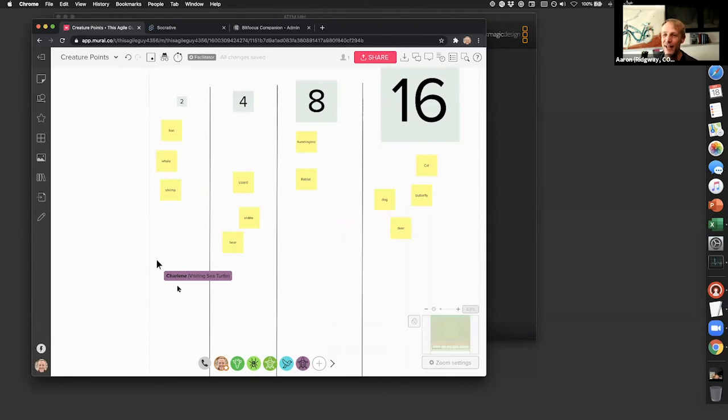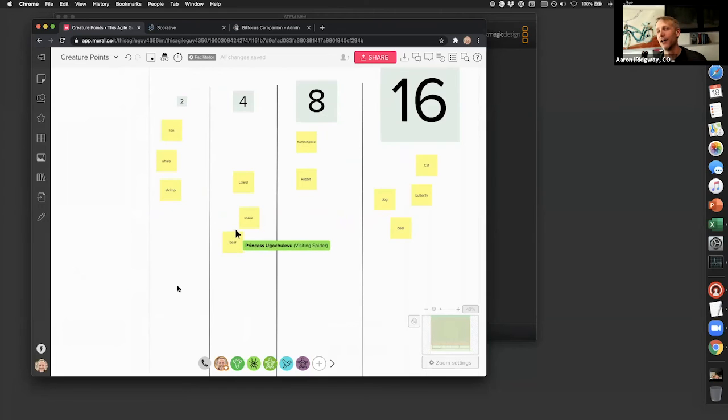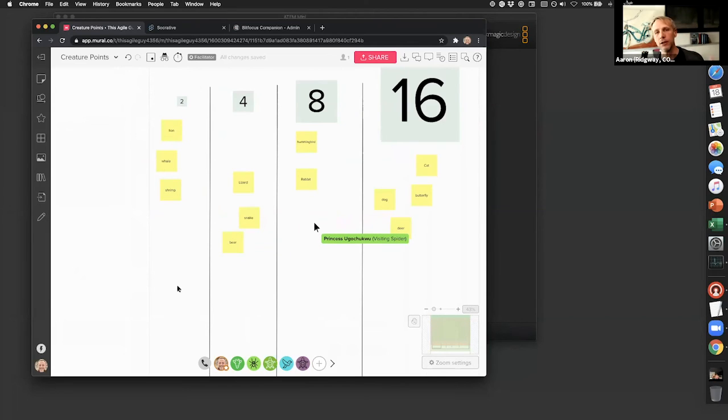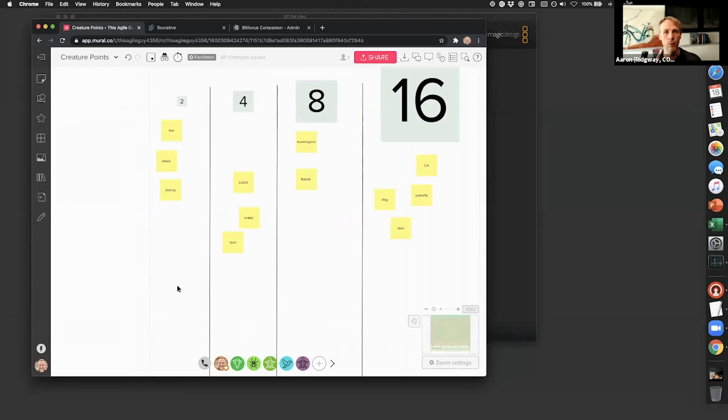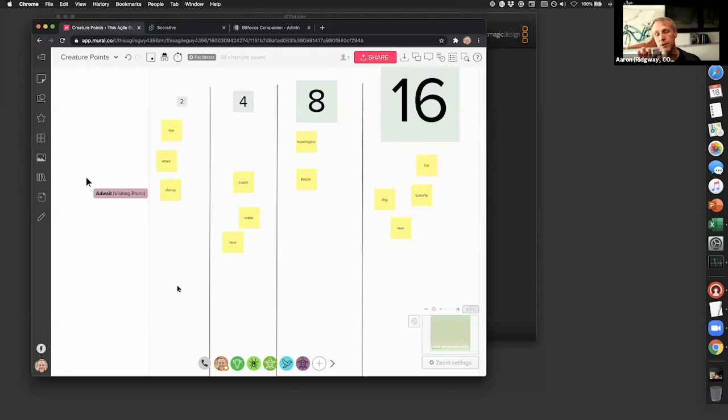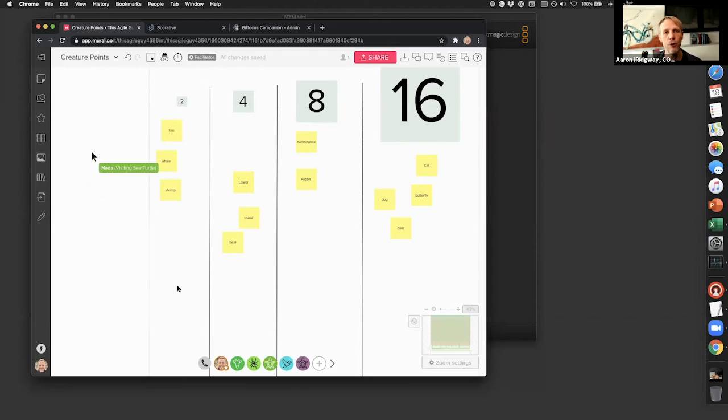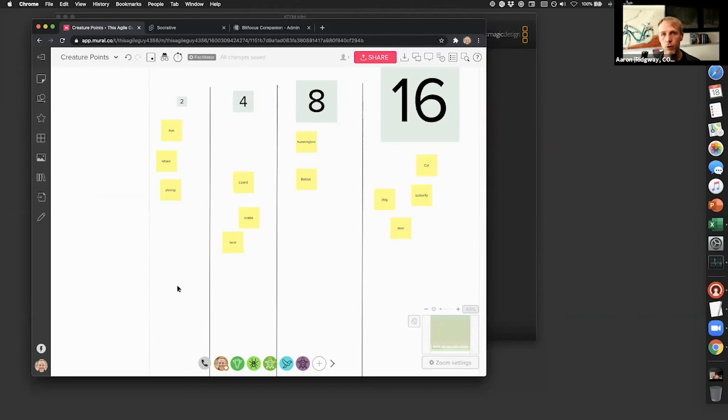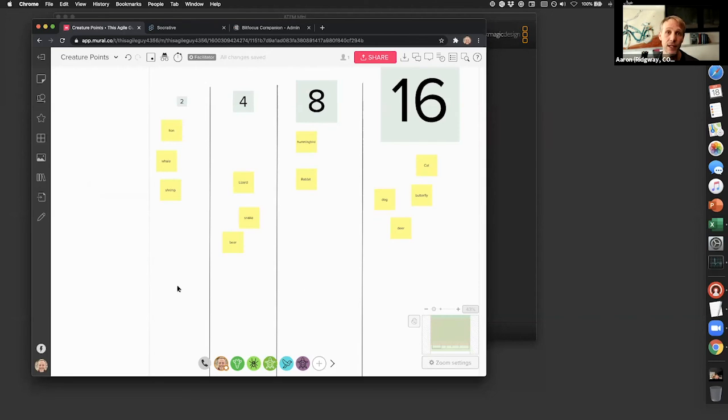There you go. Now what are these estimates based on? Each other. So we have factors like cute factor or human interaction. And then when we're estimating them, we're really just doing it relative to each other. And I like doing this sort of estimation visually, because we can start to look at are all the fours bigger than two, that's smaller than eight. If you are used to planning poker, this is an alternative.